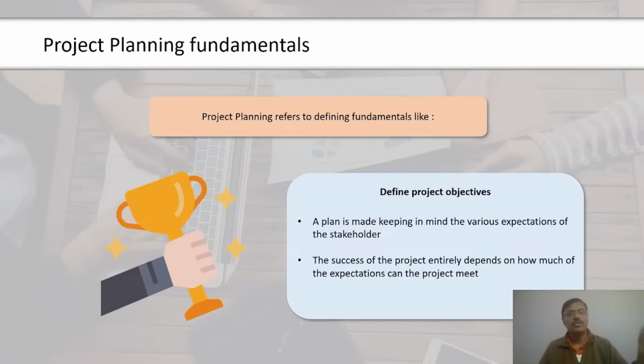There are different ways of calculating the EAC value. The method used depends on how the cost and schedule variances are expected to play for the rest of the project. BAC by CPI is used if you expect the current cost performance will continue until the end of the project. AC plus BAC minus EV is used if you expect that the rest of the project will be managed at a budgeted rate. AC plus BAC minus EV by the product of CPI and SPI is used if you want to factor in the impact of the cost as well as schedule variances. AC plus ETC is used if you want to reevaluate the project based on a forecast value for the estimated cost of the remainder of the project.